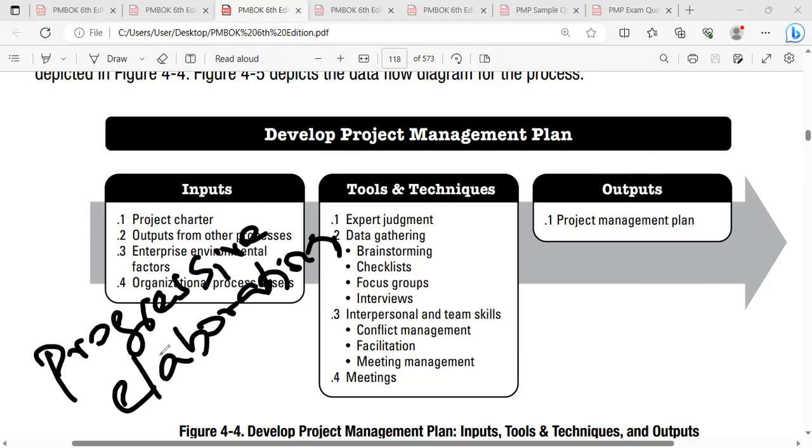Right. Once all the management plans are getting the approval and are integrated as a single master document as a project management plan, if the owner of that particular management plan wants to do some changes, the procurement department, or the IT department wants to change the communication strategy in the communication management plan, which is integrated with the other management plans, then he should not do any kind of changes directly, because any change he makes will impact other areas. So make sure that he takes the appropriate approval.